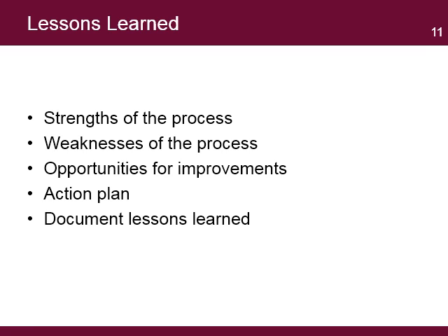The methodology for lessons learned follows a process in which the team first identifies what has been the strengths of the PMIS and then lists the areas of weaknesses of the PMIS. The team brainstorms the solutions to improve the process and develops an action plan to implement any changes to the process. The lessons are documented so other projects can take advantage of the experiences and knowledge the project produced. The project team needs to document the causes of the variances and the thinking behind the corrective action in order to enhance its ability to respond to future project challenges. The project enhances its ability to deliver its information by learning from previous experiences.